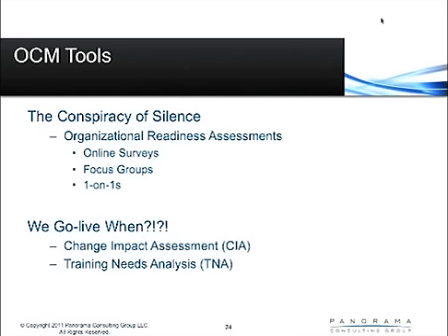What these two tools will do is help you understand how big the bread box is and how much change management activity needs to go into your effective implementation. That's why it's often so hard to determine a realistic implementation plan or budget before you've done the blueprint process, where you're essentially designing the new business processes and then doing that organizational gap analysis, because that's really going to tell you how long it's going to take.